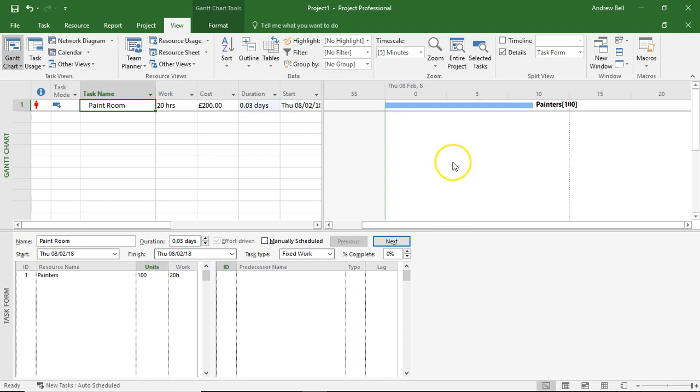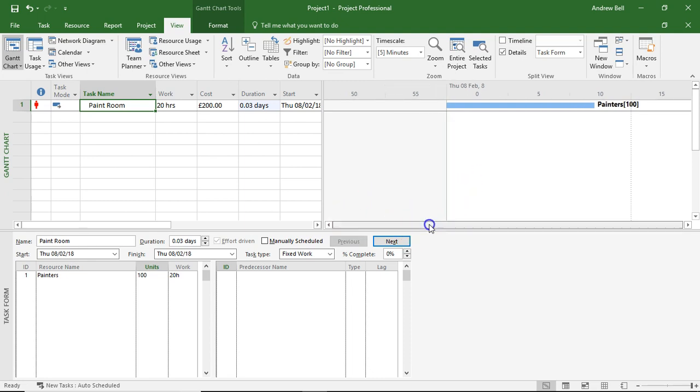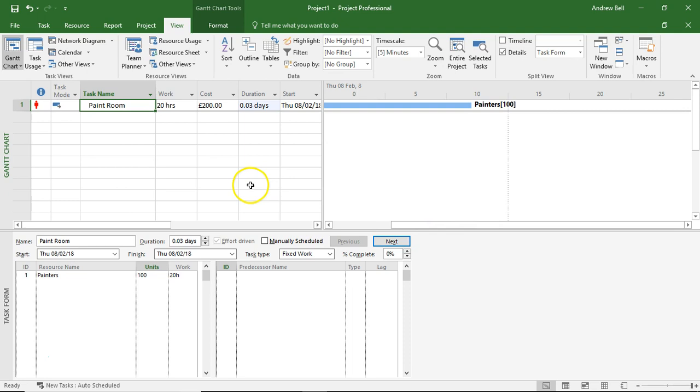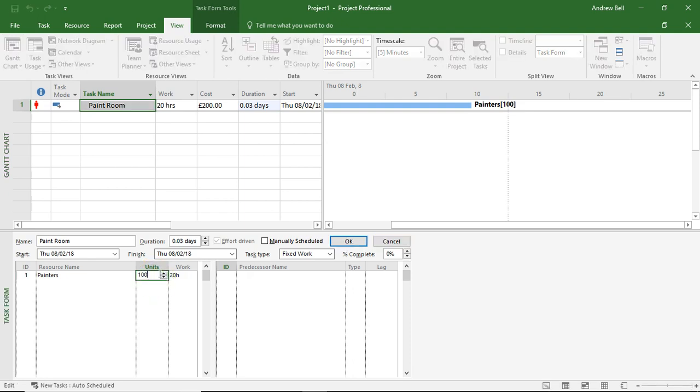which is totally unrealistic. These guys are just going to fall over themselves and there aren't going to be enough paintbrushes, paint pots to go around. So we've got to be careful. Just doubling the resources is not going to halve your duration in real life, but it will in Microsoft Project. Let's put this back to one painter.